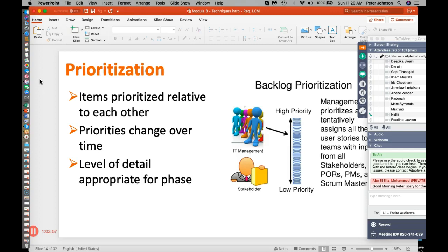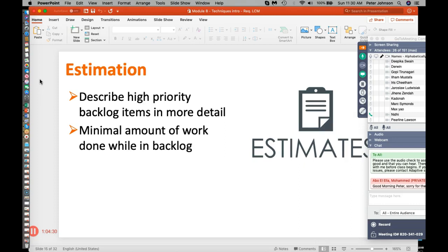And so even within that product backlog, we are doing prioritization. In Agile, we look at relative complexity for completing certain stories. Some stories are more complex, more difficult, and require more resources than other stories. That's one way of understanding the backlog. But we also want to understand the relative value that some stories give us versus other stories. And so we begin to put things in different releases or different sprints down the road.